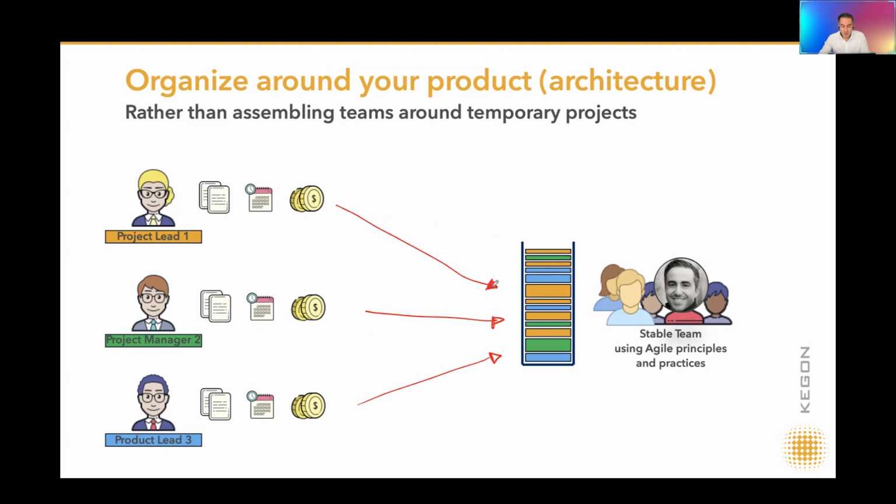But the work goes to the people, which also means it is collected into a single one-dimensional list that we call a backlog. And in a lot of environments that utilize Scrum or the Scaled Agile Framework or large-scale Scrum, we call the person who's managing that backlog a product owner. You've probably seen that before, you've probably heard that before, but we have a person who is prioritizing work and maybe even filtering work from different projects, which also means that there is a chance that work that is relatively low in priority, urgency, or let's say added value might not be done. It might be filtered out.